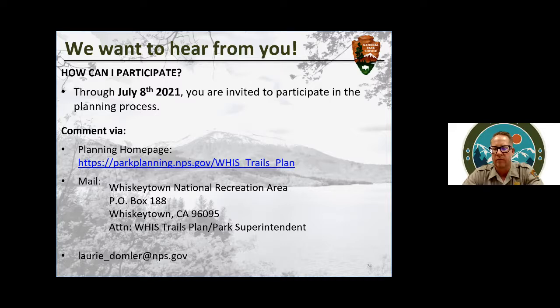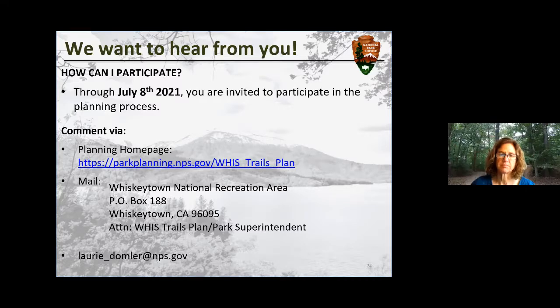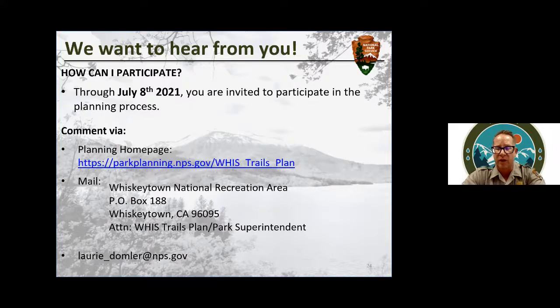Okay, another question. What is your budget for new trails and trail upgrades? It's a great question, and there really isn't a budget set for that. Often what we do is apply them as projects. So for the new trails, for instance, they don't exist, so we would put together funding requests. We would ask for the money, and when it comes, we would have a start and end date, a very definitive project, and then it becomes a maintenance issue, and that becomes part of our operational funding.